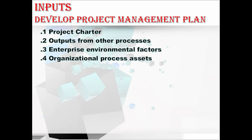Let's move to the organizational process assets, that is OPA. In the OPA, it may contain some organizational standard policies, procedures, and processes, or change control procedures including steps with official organization standards, policies, plans, procedures, or any project documents. It may also include monitoring and reporting methods, risk control procedures, communication requirements, and project information from previous similar projects — the historical information and lessons learned repository. Here we have completed all the inputs of the project management plan. Let's move to its tools and techniques.